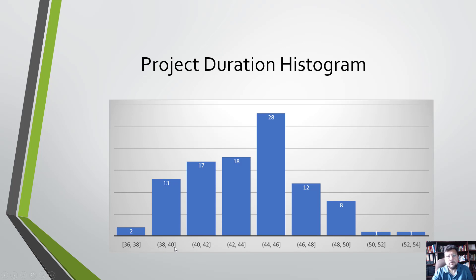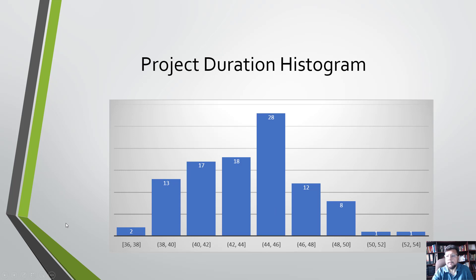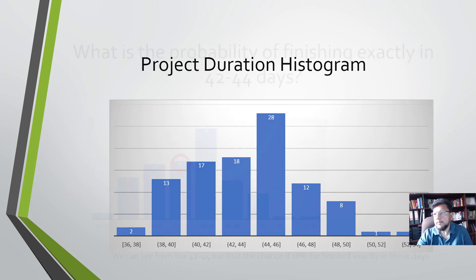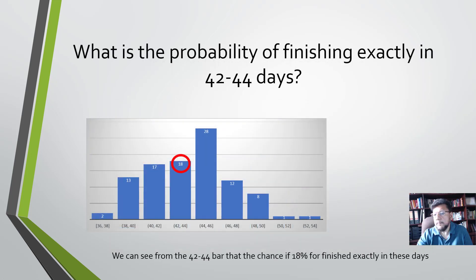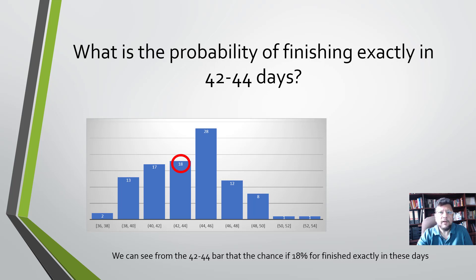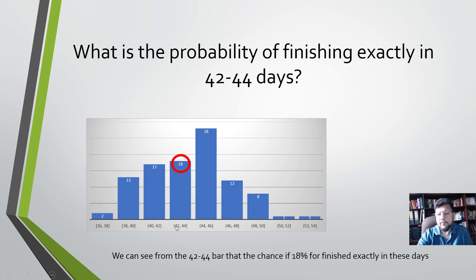Each one of these represents the frequency, and 44 to 46 days is 28 percent. Let's see how we can now use this to answer questions. What if we are asking what is the probability of finishing exactly in 42 to 44 days? To find this probability, we would look at the bar that represents the frequency for this duration.